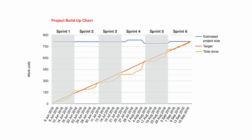This looks like either a new build or one where substantial pieces of foundational or large functionality are being developed. You can see this in these kind of bellies here, where you commit to a whole bunch of things, but no story or task is getting to a shippable increment very quickly. And it's not until you start running out of time that you tie up whatever loose ends you can tie up in whatever way you have to, to get it to that shippable, reviewable state, so that you have this sharp uptick at the end of each.